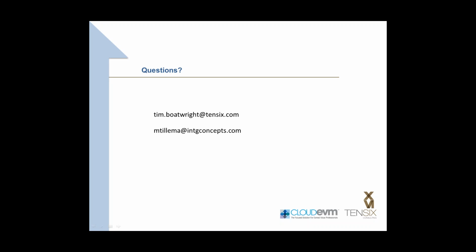Last question, Tim, for you is, we've never done earned value before, but just awarded a contract with an earned value requirement. Where do we start? Yeah, so keep in mind that even though you haven't done earned value before, likely you're doing some kind of project management. Most of the people I talk to, I always think they do the most simplistic type of project management, but that's some process that you have within your organization. So the first place you want to start is understand what you're doing today and understand what those gaps are to doing project management with an earned value requirement. Once you've identified those gaps, then you can start to look at what is the plan to close those gaps to get to earned value compliance.